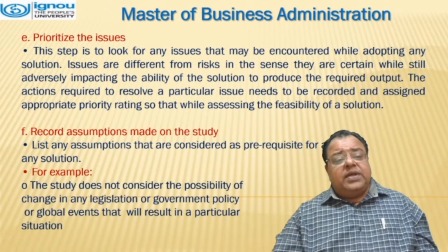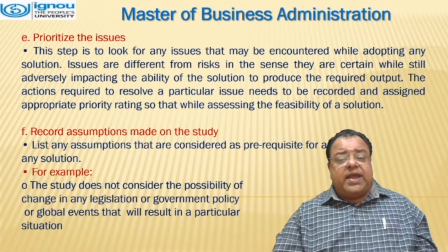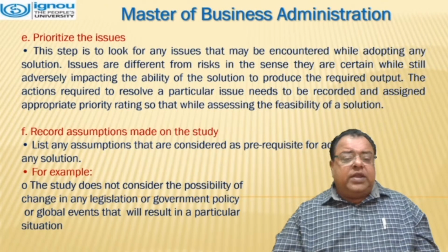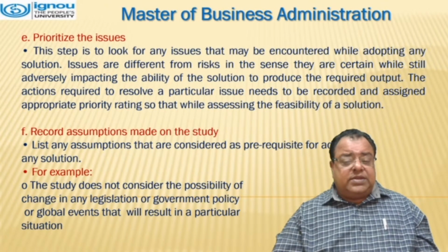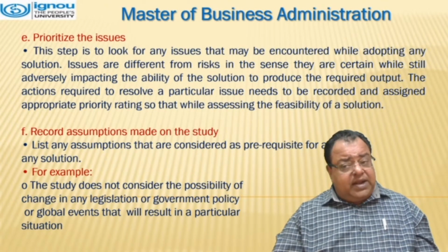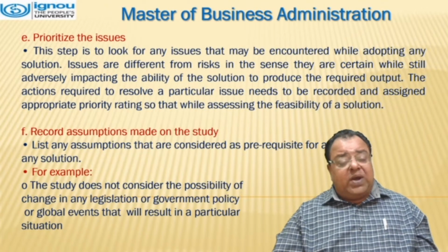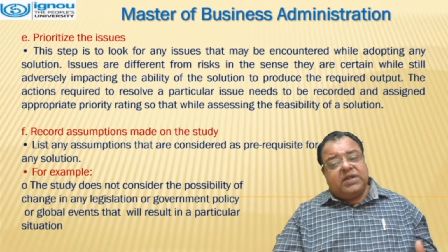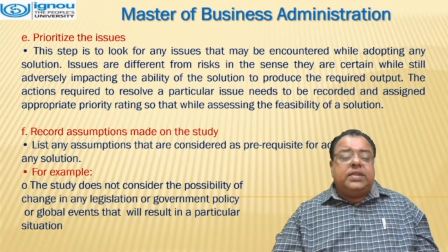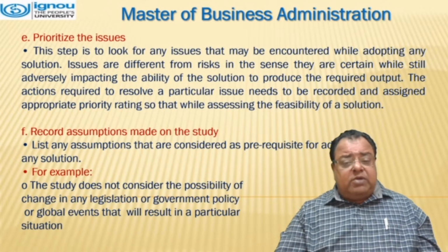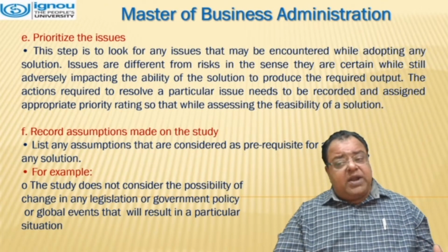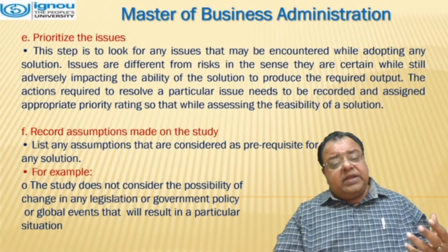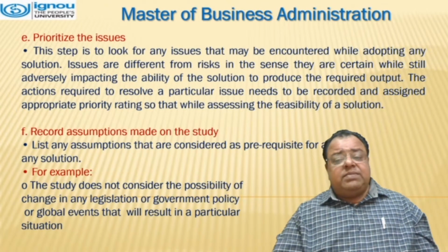Prioritize the issues. This step is to look for issues that can be encountered while adopting any solution. Issues are different from risks in the sense they are certain while still adversely impacting the ability of the solution to produce the required output. The actions required to resolve a particular issue need to be recorded and assigned appropriate priority rating so that while assessing the feasibility of a solution,